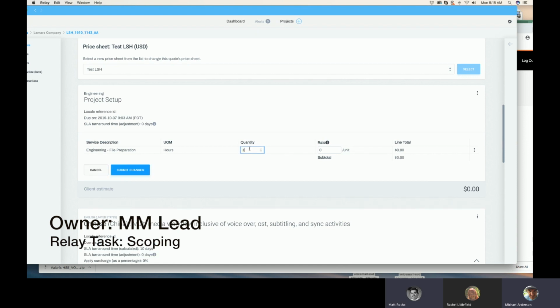Yeah. Now this CSG is typically showing up under programs for the loc engineering time to take the assets you've prepared and do the word count analysis and create translation projects in a CAT tool. But it's not necessarily only used for that. You would know because of the rate, right? A lot of times that engineering rate is like $45 or $50 an hour. It's lower than the multimedia rate. So if that's what you're seeing in a customer's setup, then your file prep time would probably land under the other fields, transcription, on-screen text, whatever.